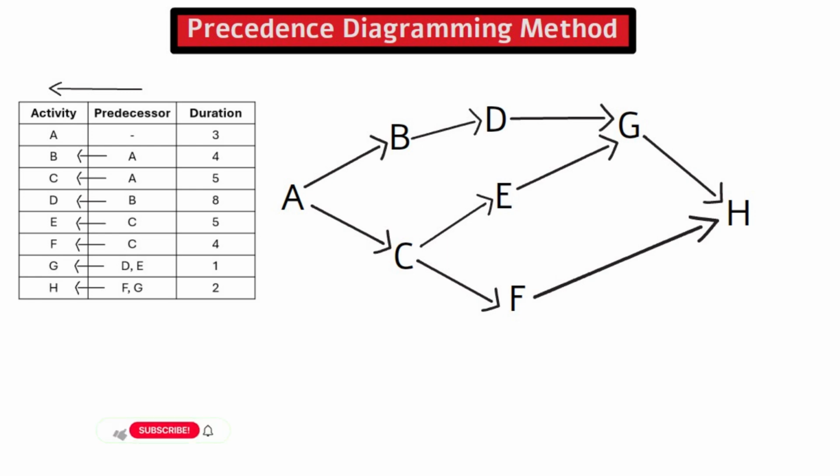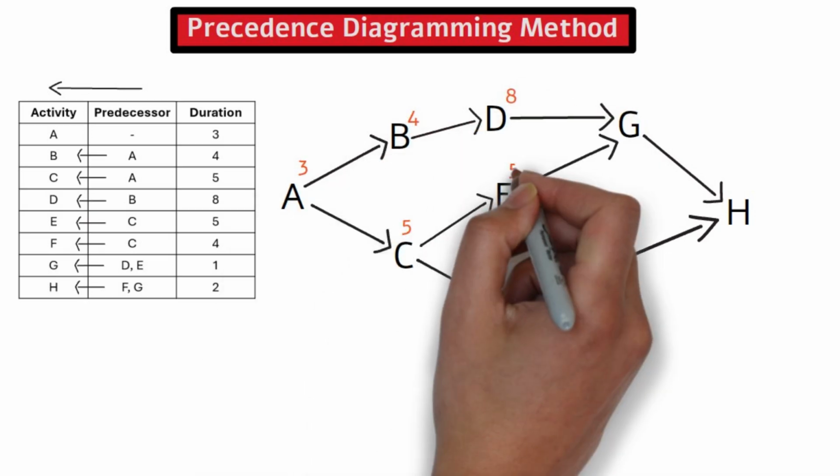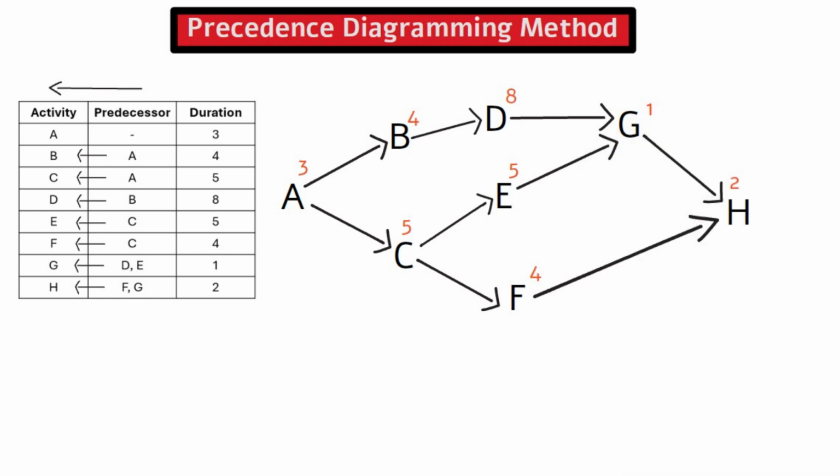Is that easier? You can also pause the video here and try the traditional approach, going from column 1 to column 2, to determine which approach comes more naturally. If all you have to do is to figure out the critical path, and you have a simple network diagram, you can figure it out by adding the durations on the path. The path with the longest duration is the critical path. I am going to write the duration on the network diagram we just created. Let's calculate the duration of each path.